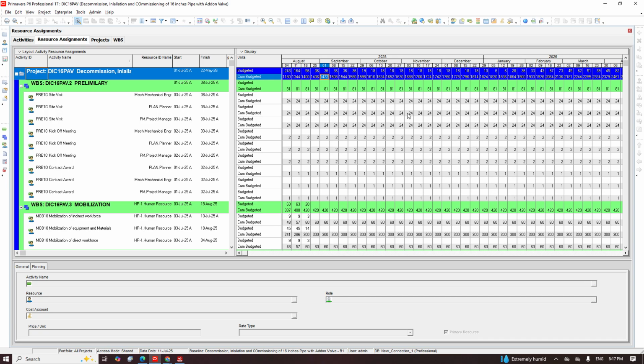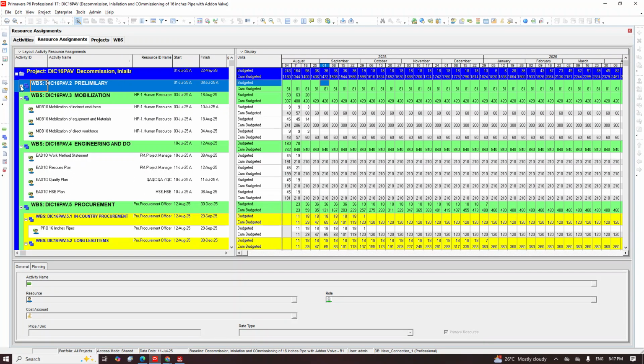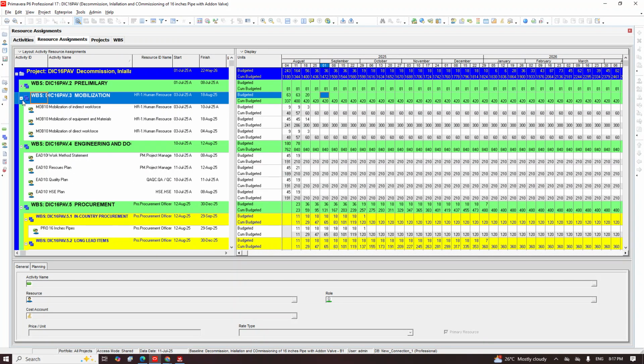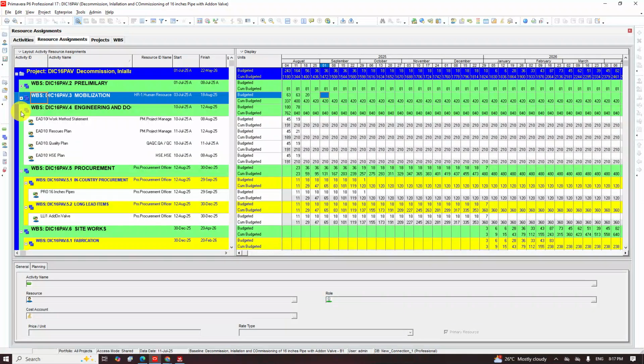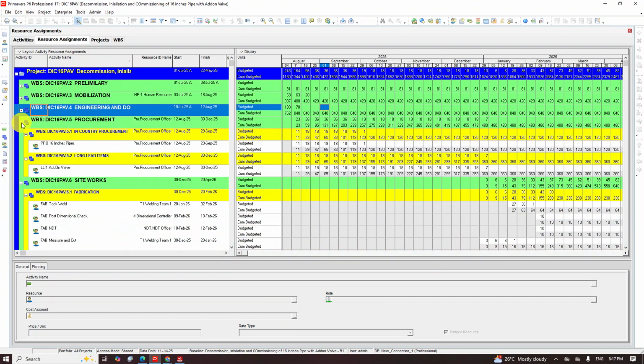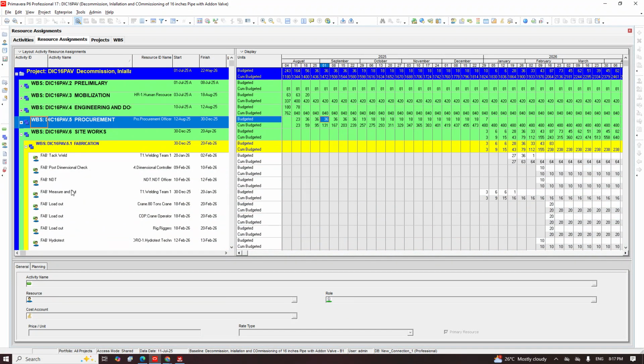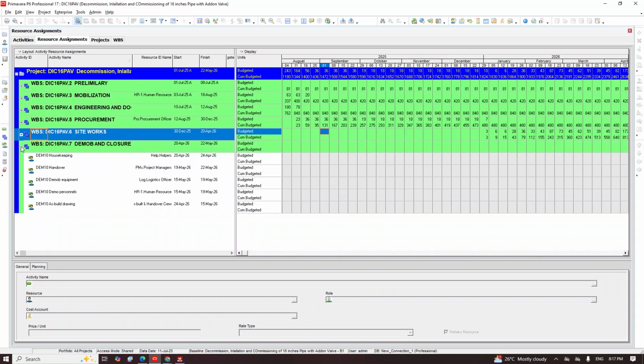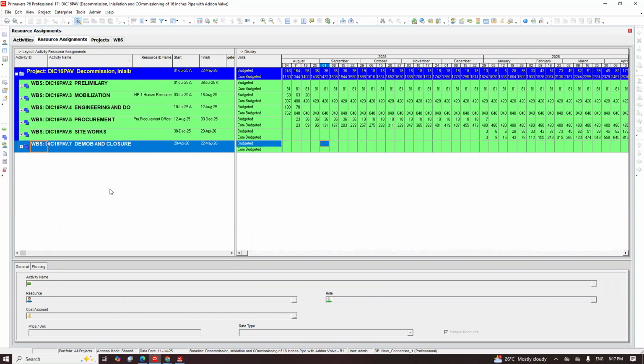All right, so that's all you have here. So now you minimize it to this level. Make sure you are seeing only the WBS. Why we want it like this is that if you don't minimize it and you do your copy, you will copy all these activities. You will copy all of them, and it's not gonna make sense because actually you don't need them. So you're gonna make your work rough and confusing. So that's why you must minimize it based on your WBS level 2.